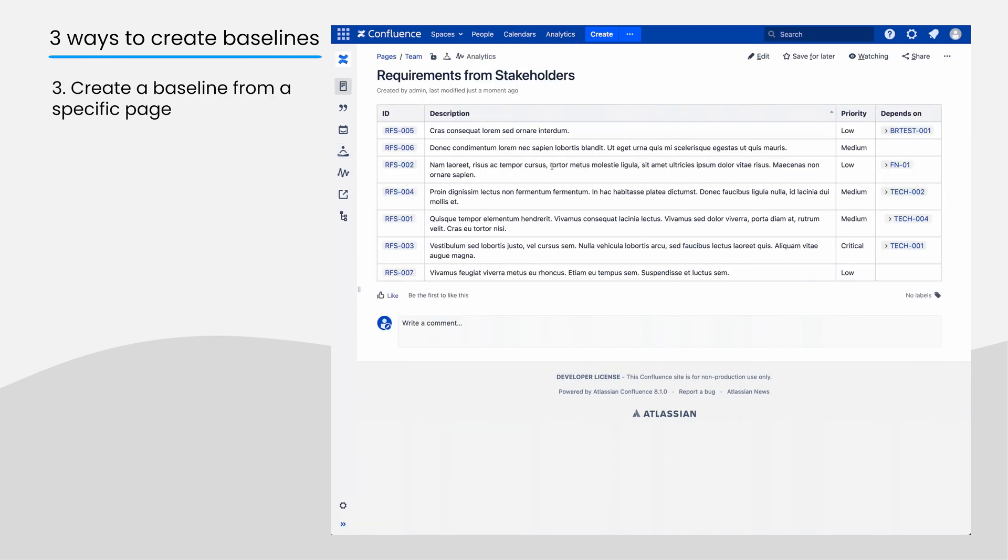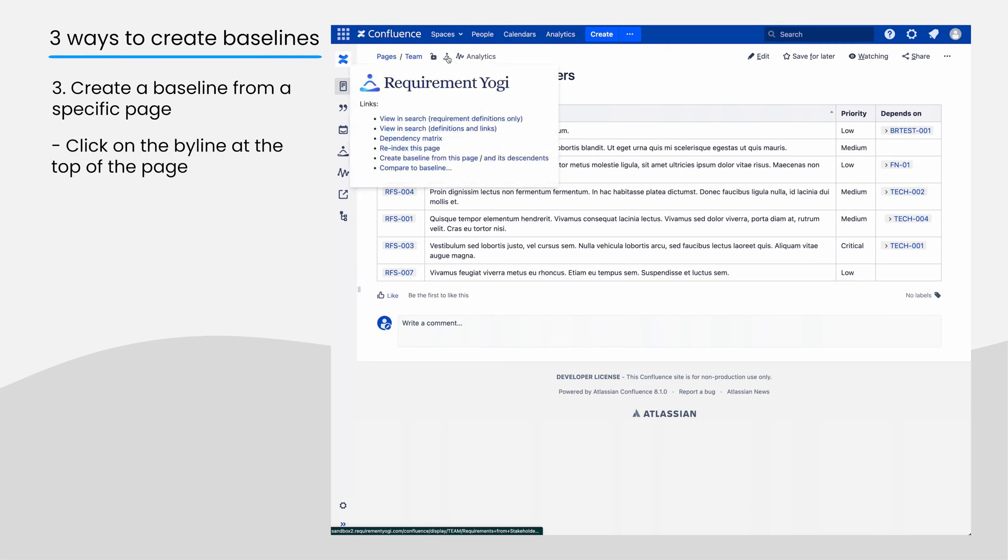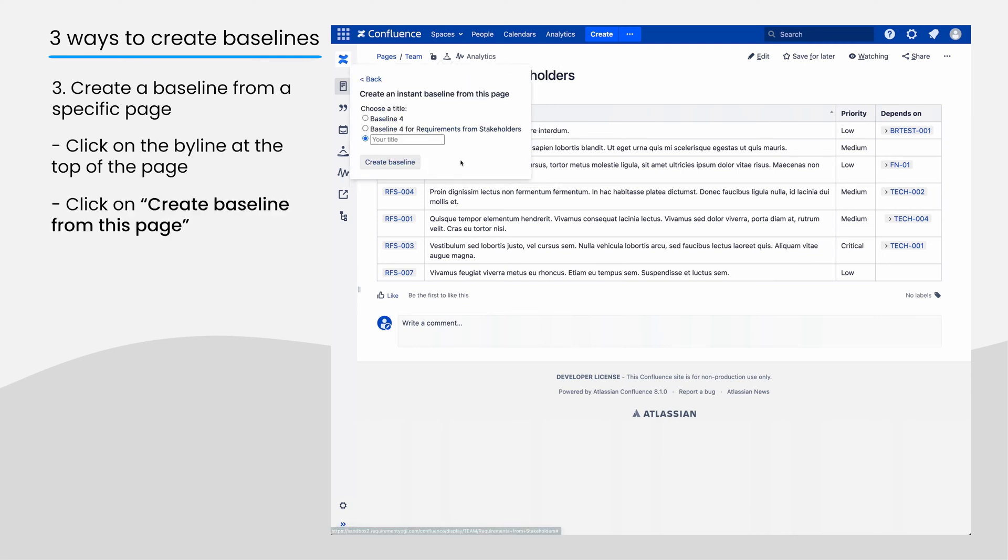To create a baseline for just one page, click on the byline on top of the page, and click on Create Baseline from this page.